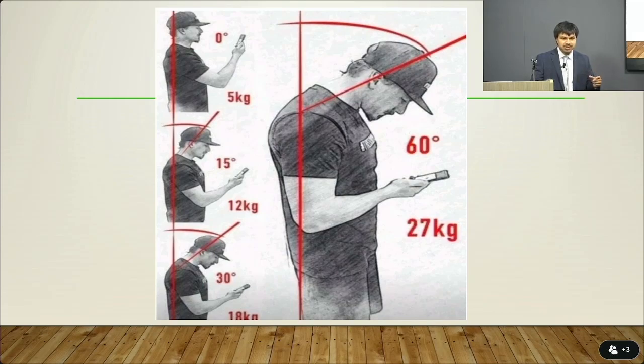However, some districts have projects that are heavy on the STIP, because most of the STIP is, as we said, the State Transportation Improvement Program. That means you're adding a lane. That means you're adding more cars to the existing highway. That predominantly local MPOs take the lead on. However, for example, North region or some other regions where they don't have local transportation measures, those are called non-self-help counties. You might have more STIP projects. For example, North region, District 1, 2, 3, you might have STIP projects. But if you look at District 4, most of the STIP is going to be undertaken by the local MPOs. It's not uniform across, but I'm just saying that's a typical scenario.